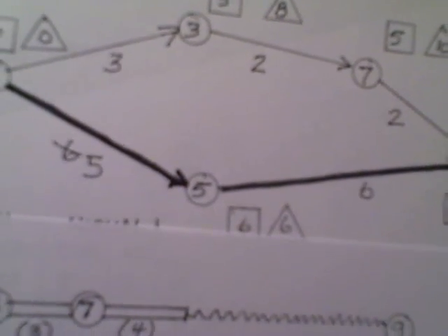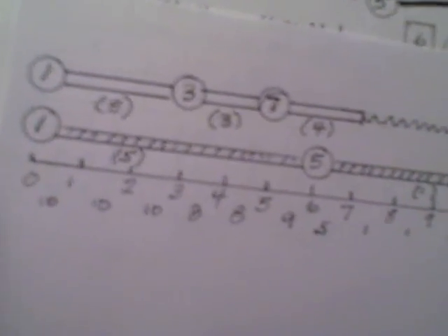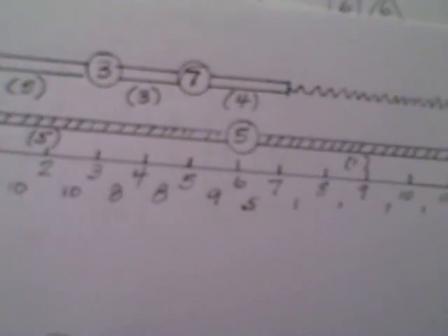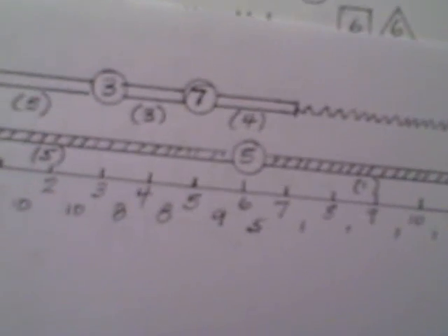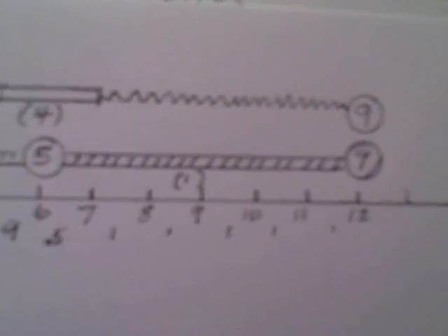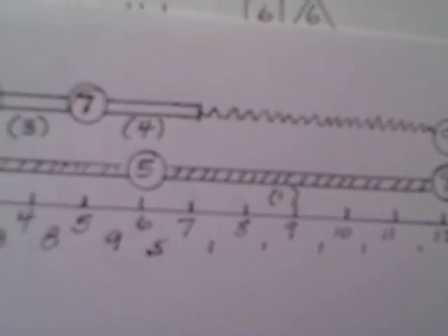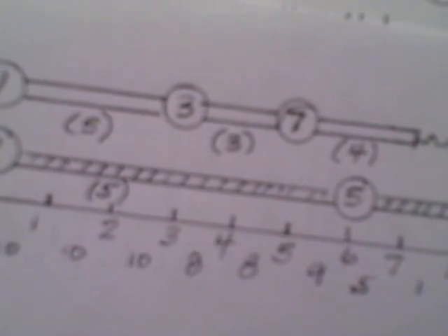The first thing you need to do is to draw a diagram, and you see these diagrams in our textbook. I've drawn one here, and it's called the time scale diagram. They're very simple to draw. Basically, what you're doing is squashing the arrow diagram down into a bar chart of sorts. You can see the first thing I did was to draw the critical path as a single line across the chart. This cannot change normally. That line we normally do not change because otherwise we would extend the project. So that is fixed on the diagram.